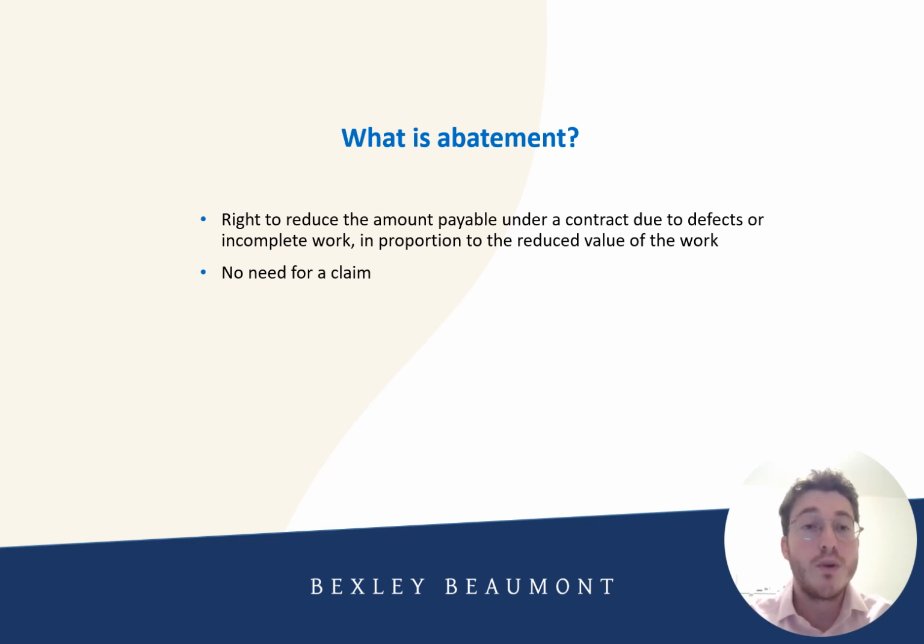Now, the important point with abatement, which is unlike in set-off, is that abatement doesn't require a separate legal claim. It is an automatic right. However, as I have advised, and this is the really important point, any deductions, any abatement must be reasonable and proportionate to the defect or the incomplete nature of the work.